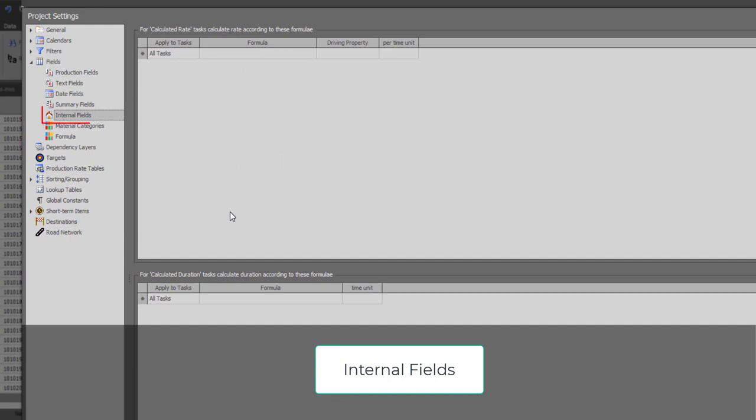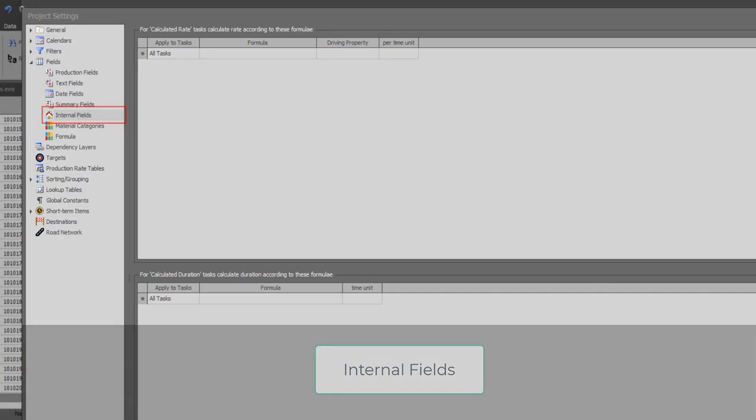This page allows you to add formulas for the EPS internal fields which are duration and rates that will be used by those tasks where the task type is specifically set to calculated duration or calculated rate.